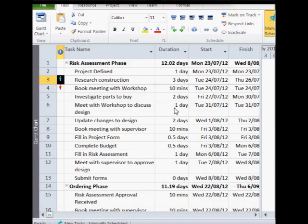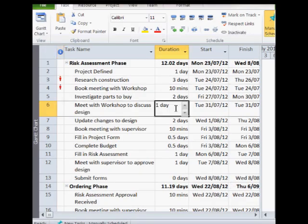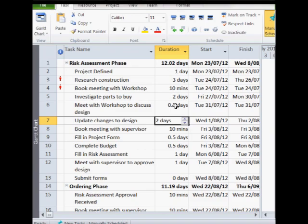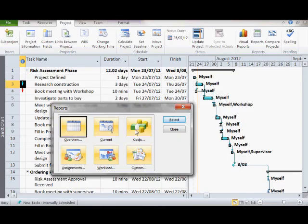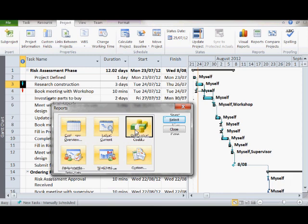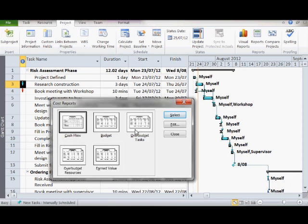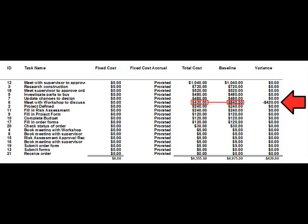I am now going to change the duration of the workshop meeting to half a day and re-run the report again. You'll notice that the cost of the task has reduced, and in the variance column you can see that you just saved $420.